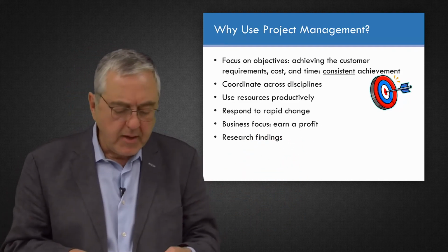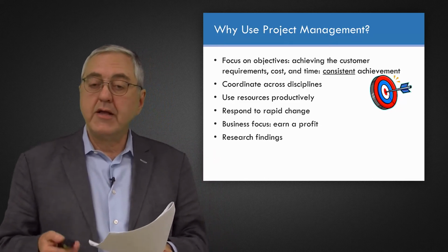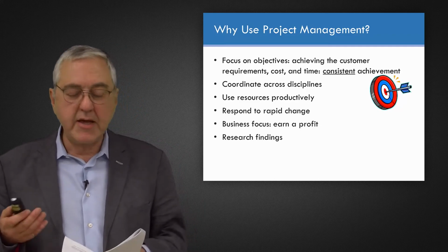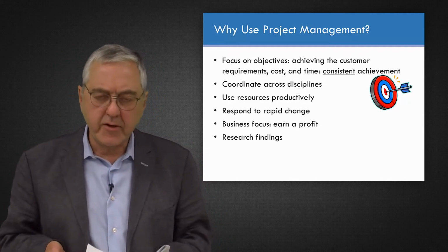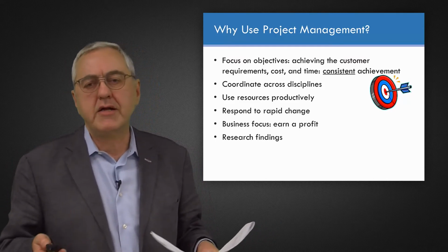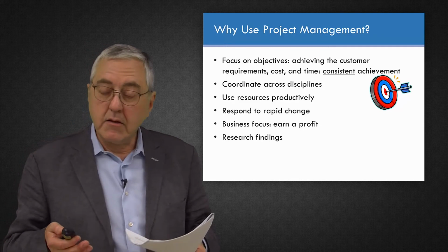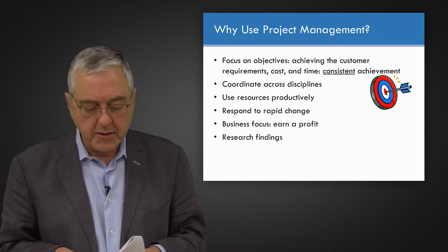Very hard to do. They found that there is a return on investment from an organization investing in improving its project management maturity, and that was in the range of 15 to 40%. Unfortunately, because the data is so hard to get and measure, the statistical significance of that correlation was low.